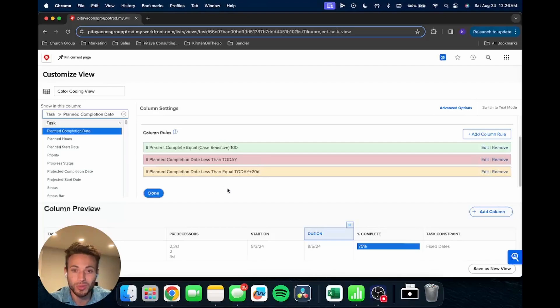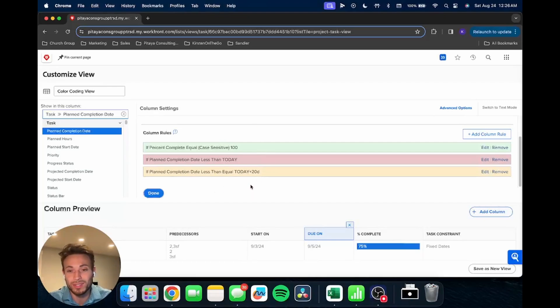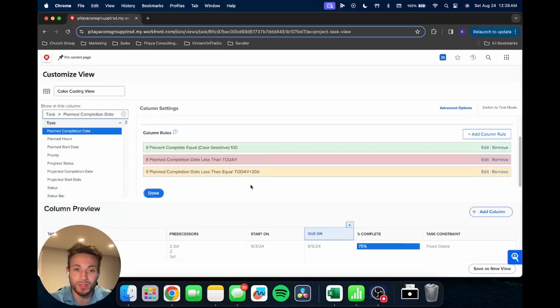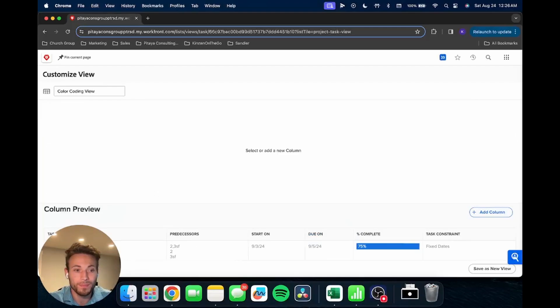So you just got to remember, as you're setting these up, that there is order logic to how these are set up going from the top to the bottom. So if you ever run into an issue or you're setting up multiple rules and one of them doesn't work, that would be the first thing I'd check is make sure things are in the right order.